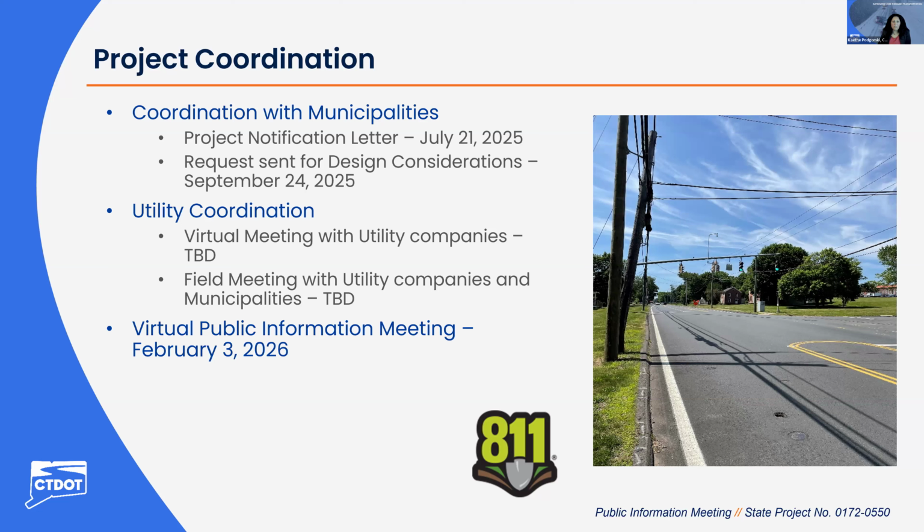So some of our next steps as we wrap up preliminary design here are to do more coordination with the utility companies. So we'll have a virtual utility meeting, which is a big one for the locations throughout all these different towns with a lot of different utilities, and that just gives an overview to everybody of what's happening. And then we follow up that big meeting with individual field meetings with the local officials and the utility companies that are relevant for each location. So that's a good opportunity to take another look in the field with some additional folks there.